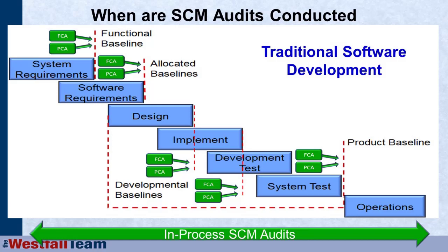So the recommendation is that you do in-process audits throughout the entire development cycle to make sure the product's being built correctly, that configuration management is being done, that we are implementing corrections and changes as needed and verifying those as they have been approved by the appropriate authority, that unauthorized change isn't happening, that our baselines are being created with the correct components, etc. So we're going to do these in-process audits throughout.